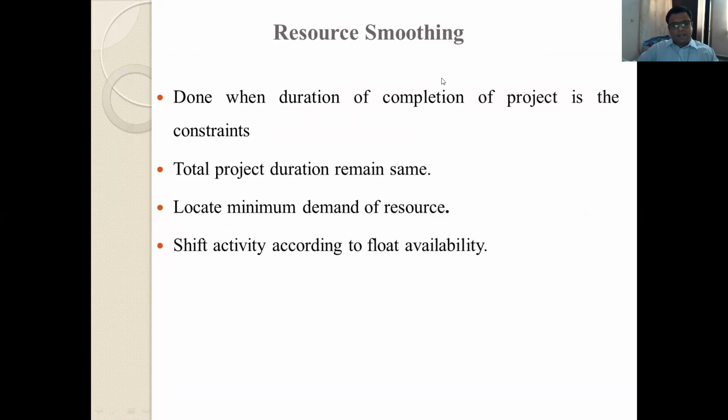Then we have started with resource smoothing. It is done when the duration of completion of the project is constant, the total project duration remains the same.